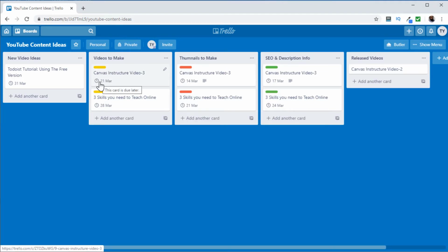This video shows a release date. Then someone needs to work on the thumbnail before that date. So the thumbnail should be ready by 14th of March, and then someone has to do some SEO and write the description of the video, and this should be ready by 17th of March. Now this is the release date of this video, but this is not very useful because in order to write this description, this person needs to watch the video.